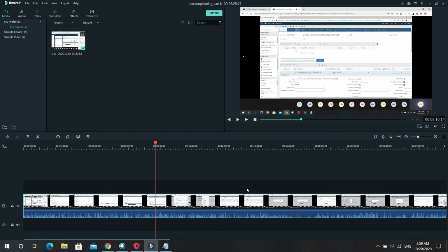You can either select it or type it in. I usually just type it in. So now the crane operator is related to task 10 so they can start at the same time. Okay, start to start. Yes. Everything else looks good. You've got your tasks in front of your crafts, and your hours are down here. Yep, looks good.